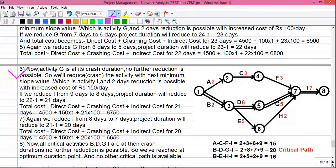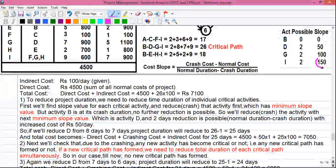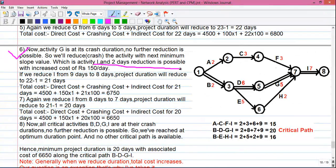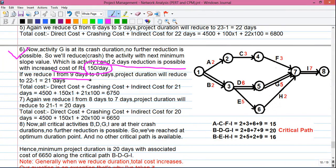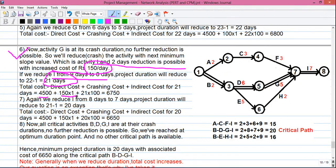Step 6: Activity G is now at its crash duration, so no further reduction is possible. The next minimum slope value is activity I with slope 150 and a possible reduction of 2 days. We reduce I from 9 days to 8 days, bringing the project duration to 21 days. Total cost: 4500 + 150×1 + 21×100 = 6750 rupees — reducing cost by 50 rupees.